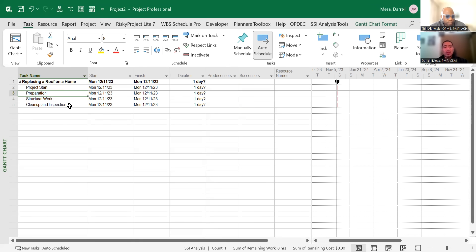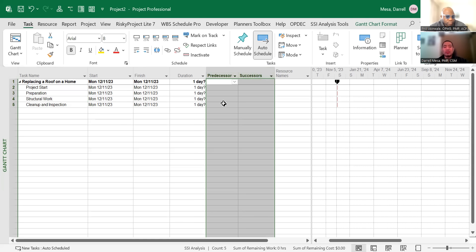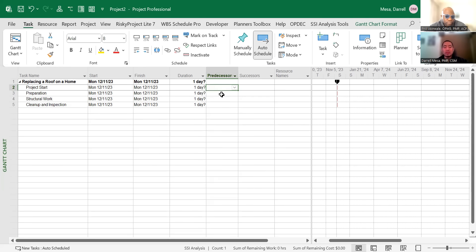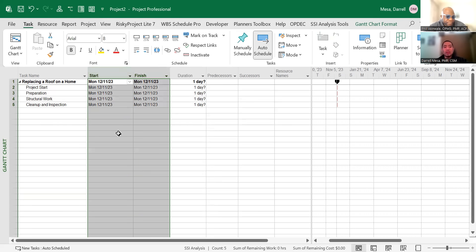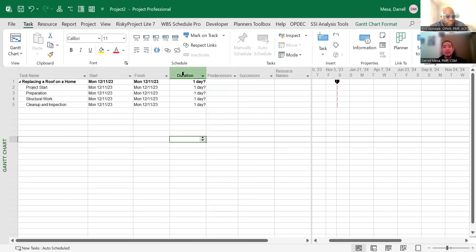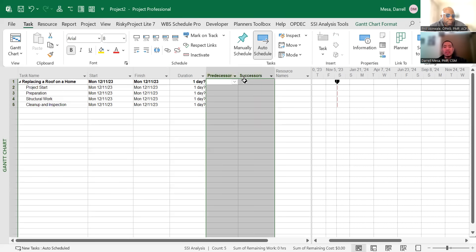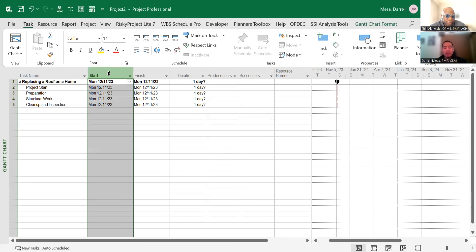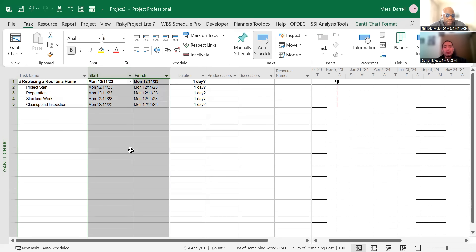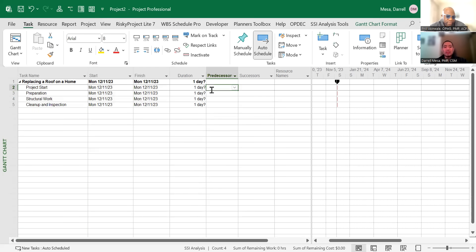Task ID three needs to finish before task ID four needs to start. So these columns right here, the predecessor and successors, are more of the linkages or the dependencies that these subtasks will need to be connected to, and that also determines the duration days for your project. In Microsoft Project you won't need to worry about updating your start and finish because there are certain parameters that will update that based upon the durations and linking each subtasks together. So you mean I don't need to type in any dates at all? Not in Microsoft Project.